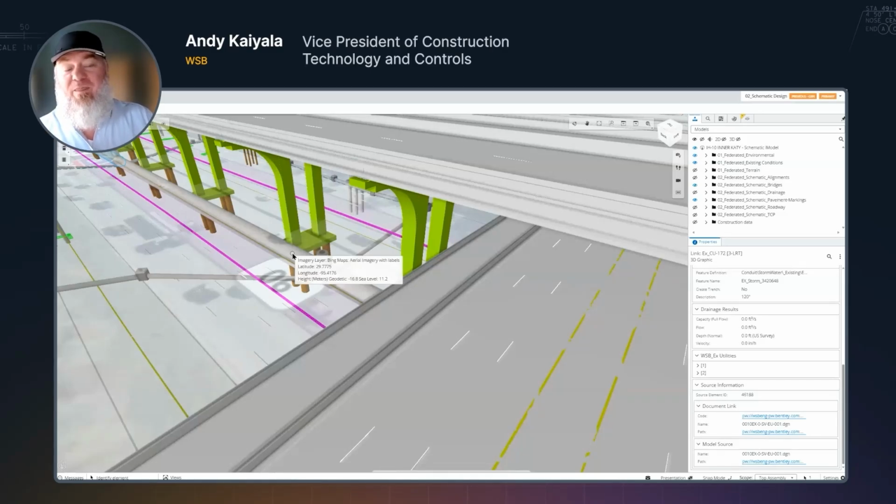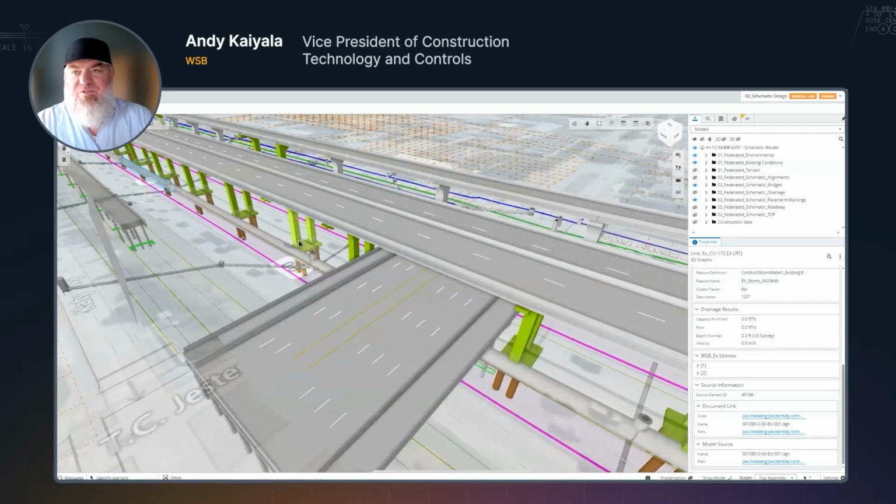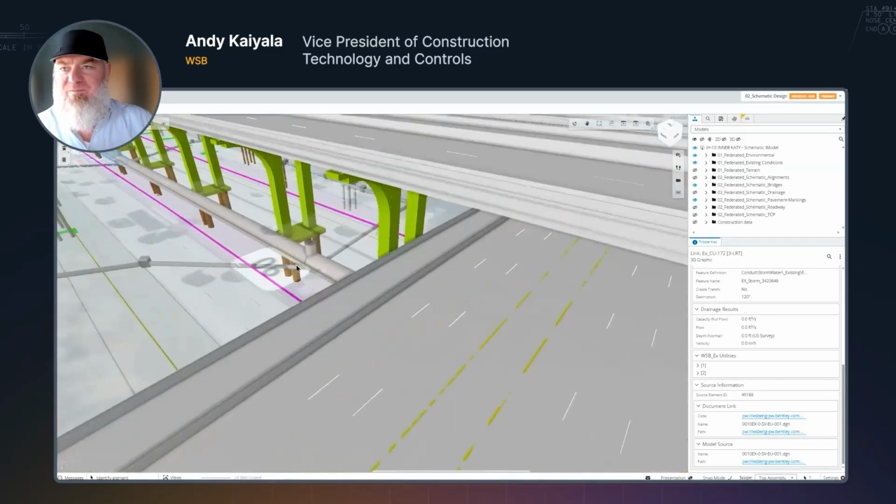Everybody knew that. But what we really didn't consider was that this foundation was going to need to go in at a point in the construction where obviously we still need to be able to drain it. And what are we going to do with that water once we take that trunk line out of commission? That led to a number of discussions and a change in the design and the construction sequence. So the value of this, why is it, going back to what I said earlier, concrete and specific and delivered quickly enough to make decisions?